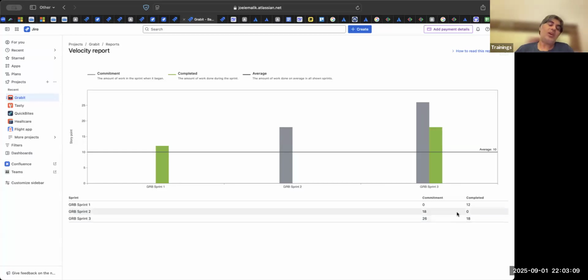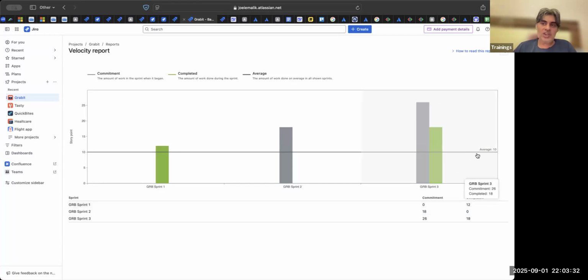You can find your completion rate either based on your stories, or you can also take your work items individually, task level, story level, bugs level, everything. I'll show you how when we get into metrics. But for now, since all of you were asking questions on sprint planning, this is how you do sprint planning. You need an availability sheet, then you need a velocity sheet. Velocity sheet gives you the average velocity. So you take the average velocity from the last 3 to 4 sprints. That gives you a rough indication of how many story points you can complete.